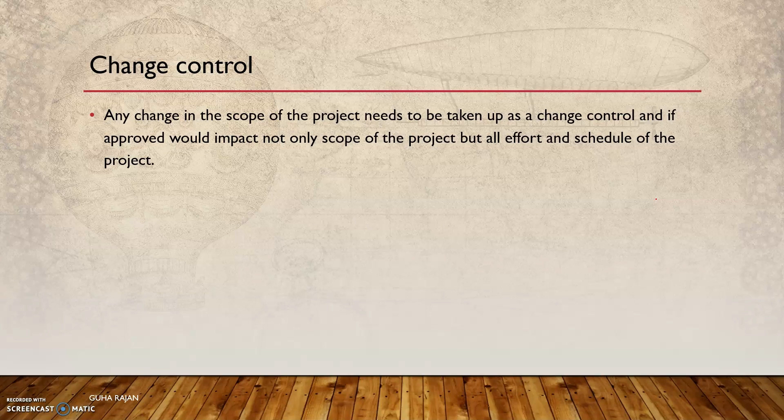What is not agreed upon — even if there is no cost impact — still needs to go through the process. A user may say, 'I need this functionality, there is no effort, just change it,' but all of this needs to go through the change control process, because somewhere it might be documented differently and some cost could be affected.